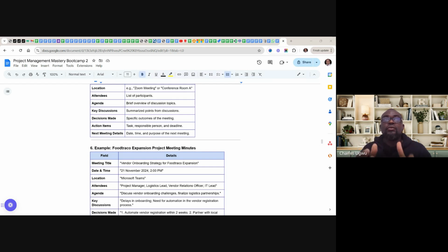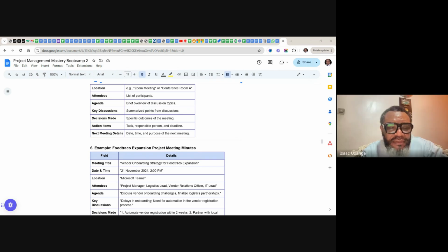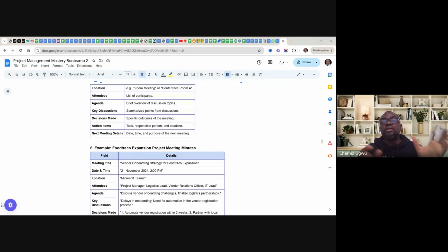So, if you agreed, because agile stresses consistency. If you decide that your daily stand-up meeting is going to be by 9 a.m., if you start by 9 a.m., you cannot change from 9 a.m. You must be at 9 a.m. If you need to change, you must have an urgent, crucial reason. Agile stresses so much on consistency. And it must be 15 minutes. So the meeting environment is highly structured; if you want to adopt it, everybody has already agreed.